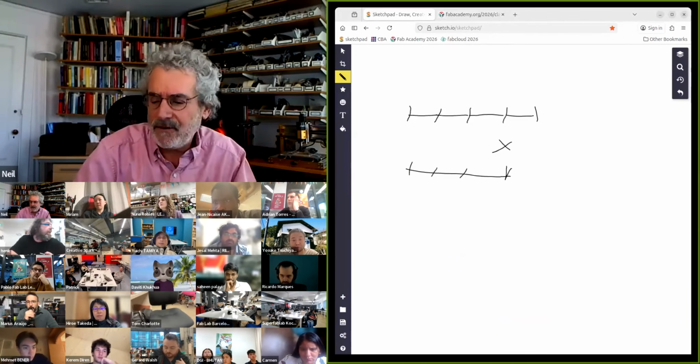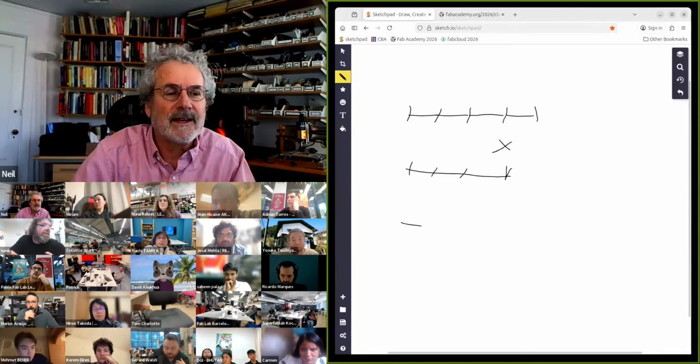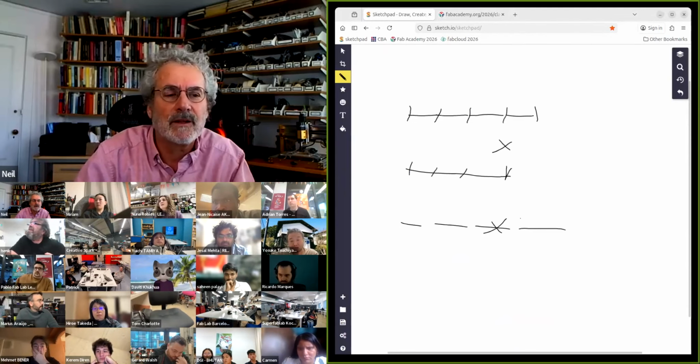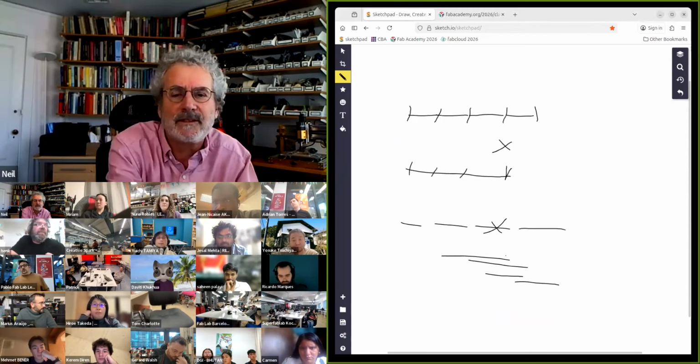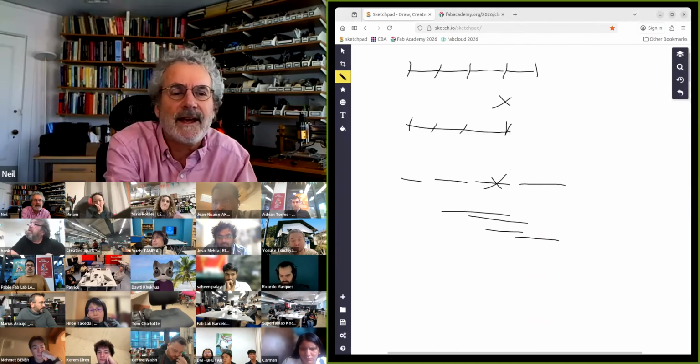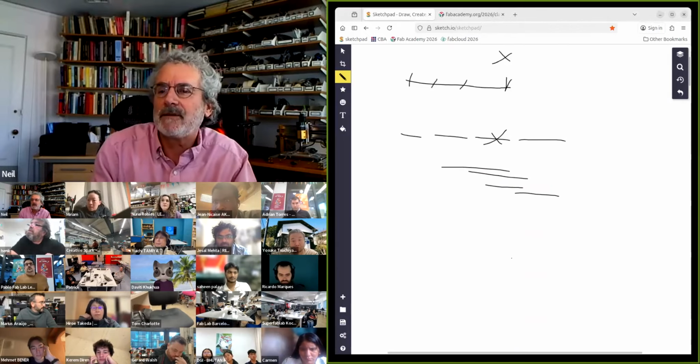Likewise, if you do task, task, task, task, if one task fails, it blocks all of them. So the charts I showed you show tasks running in parallel rather than in series. So one task can't block all of them.